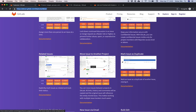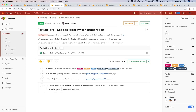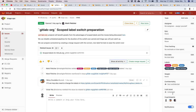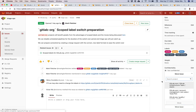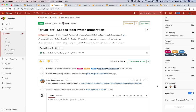Moving an issue to another project — you can move an issue to any project. What that does behind the scenes is close this issue and open an issue in the target project. It's an abstraction: what's really happening is closing the issue and copying all the contents — title, description, sidebar information, comments, thread — and pasting it in the new target issue created in the target project.